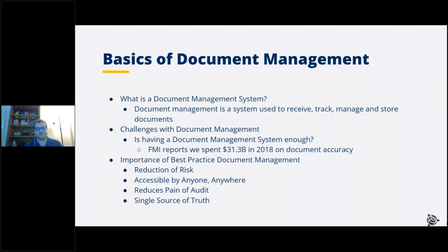Think of how important submittals are and when they're being provided, and being able to say when that was provided and when it was reviewed. Being able to answer the following questions: What did the original spec sheet and drawing say? When was the document modified? Did the contractor agree in writing and confirm the updated spec?